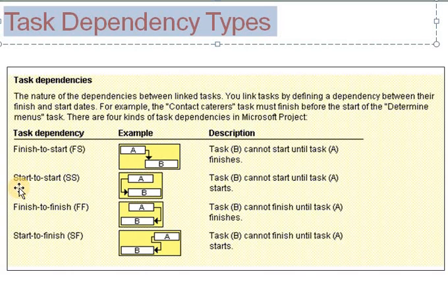Similarly, start to start dependency can be represented by SS, and according to the diagram, task B cannot start until task A starts.